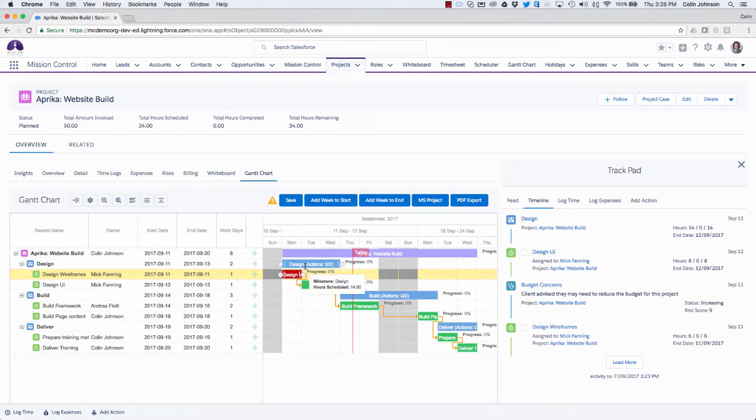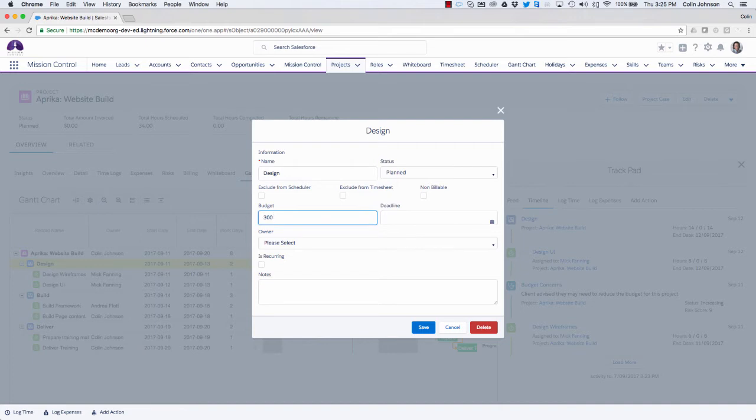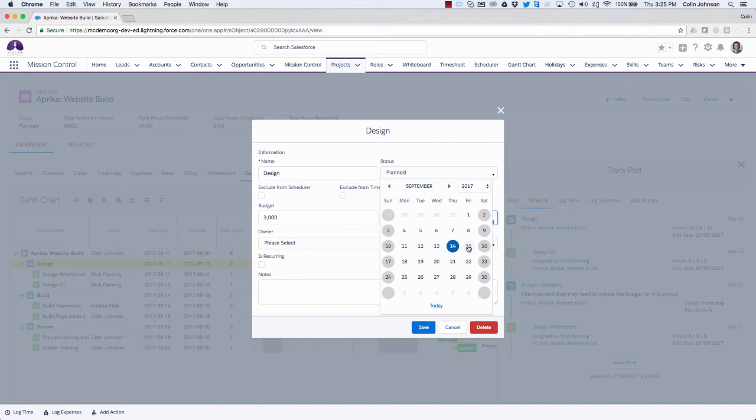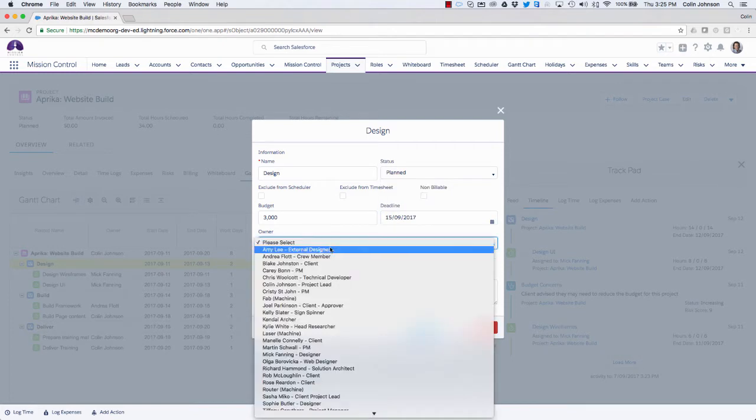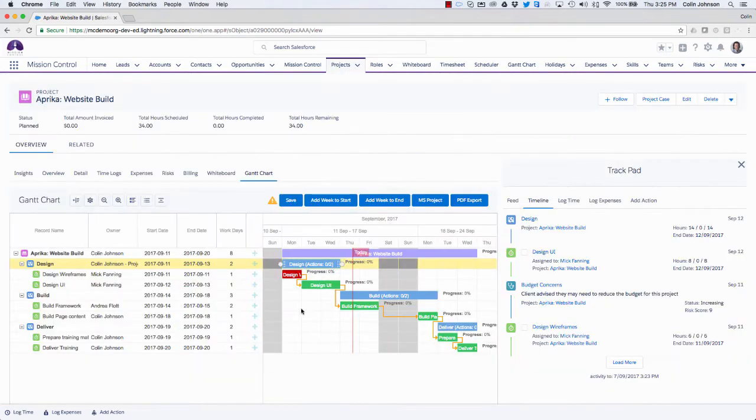I also have the ability to edit the milestone as well. So if I double click into that, you can see I can set things like the budget for delivering this particular milestone. I could be setting the overall deadline for when this work needs to be done. So I'm going to say here that everything in the design milestone needs to be done by the 15th of September, and I'm going to set this person to be the owner. So save that. So I can make a number of changes as I'm going through.